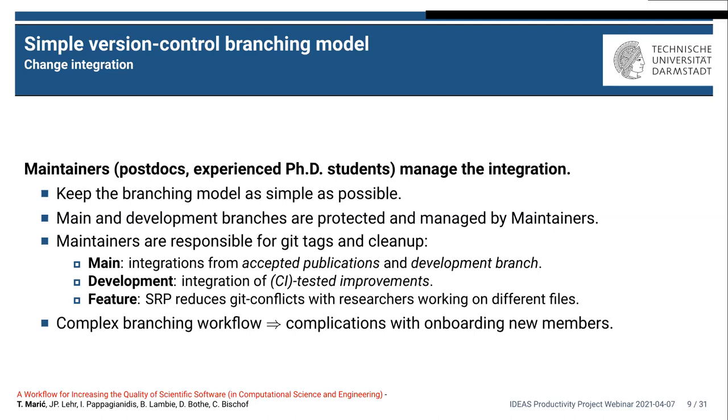Yeah, of course. We tried using Agile and Jira also, and applied this inside the collaborative research center. The problem was basically that it was a huge overkill, because, coming back to the scientific pressure to publish that I'm feeling also daily, getting people to adopt separating things into epics, stories, tasks and subtasks, and maintaining these boards was a huge difficulty. And with Kanban boards, at least what we can see is that this keeps things very loose. So there's not such a strict prescribed structure. And people see the benefits in at least having an overview of all the problems and all the tasks at hand that have to be done. So this is something that's at least directly beneficial.